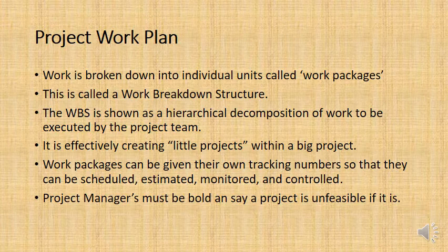But the design of the foundation can also only occur before the geotechnical study to see what the ground conditions are. And also the foundation construction can only happen after the foundation design. And you can see that we're already breaking down the project into various work packages.